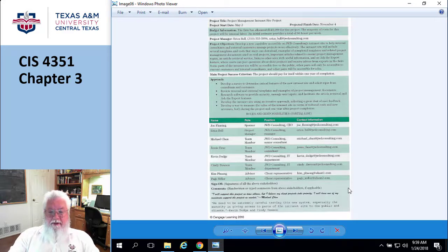Okay. There's another thing they talk about, and that's what they call the stakeholder analysis. Now, quite frankly, I've never done this in real life. I would be scared to do this in real life. But if you look on the page, one of the things they talk about is a separate listing showing the level of interest that the person has and what their level of influence is over the project. Ew. Personality traits. Wow, I am not going to put that on a piece of paper. Whew. No way. Anyway, project charter.